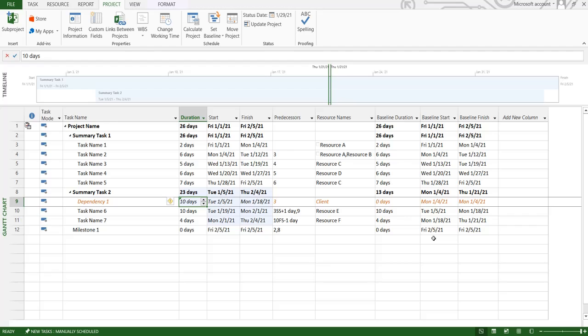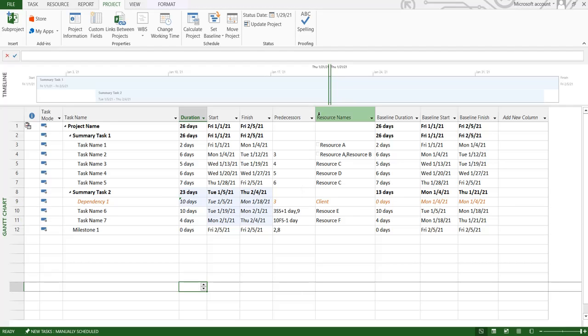So you can identify which were the tasks that were not completed as planned or which took more time than they were scheduled for. So this helps in identifying your task slippages and the key areas of the project plan which took more time than planned. So over here you can see the duration and the difference in baseline duration. So that will help you while running the reports.